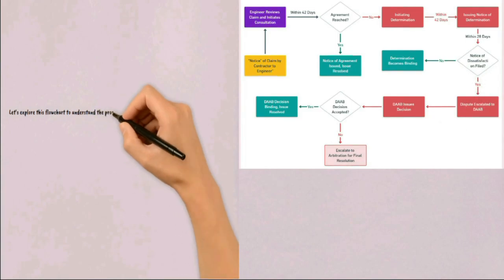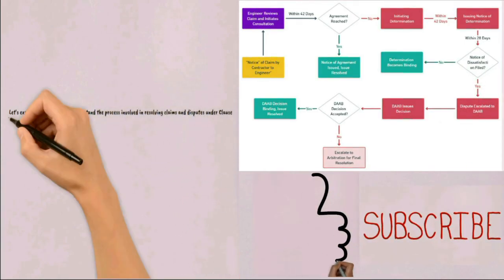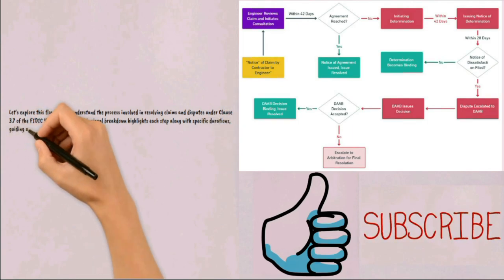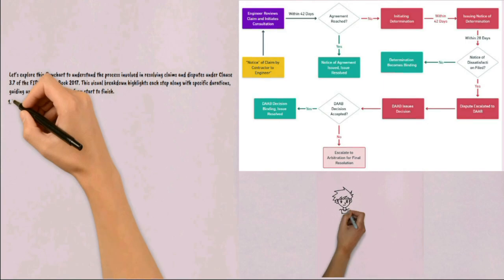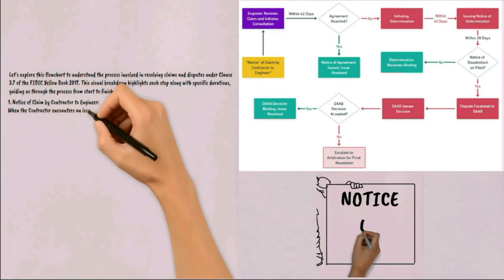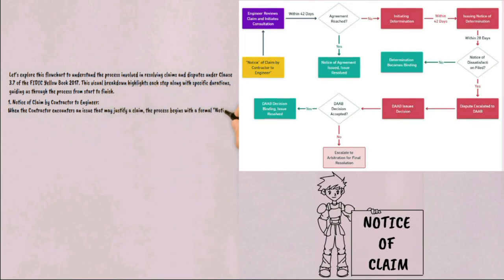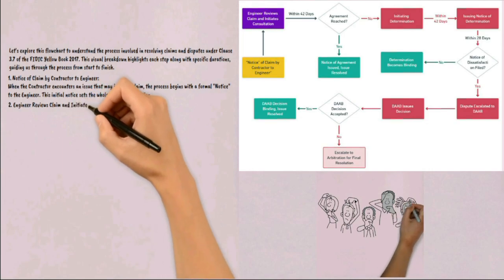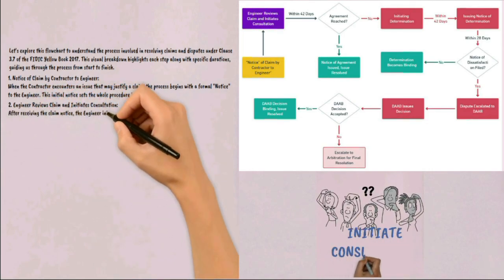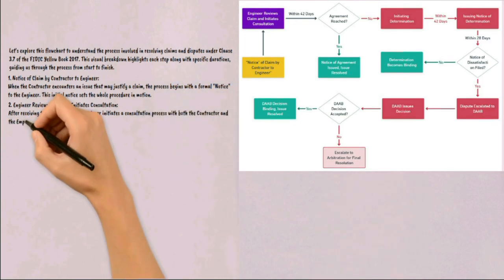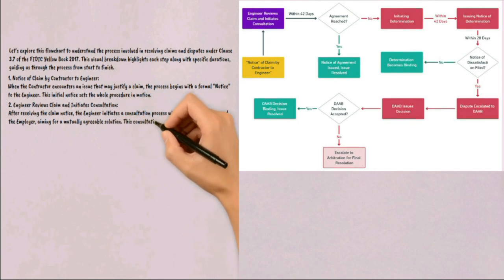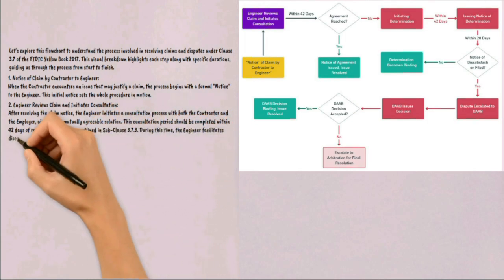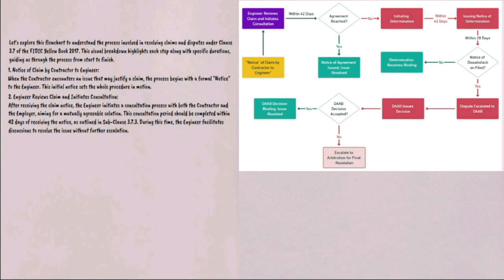Let's explore this flowchart to understand the process involved in resolving claims and disputes under Clause 3.7 of the FIDIC Yellow Book 2017. This visual breakdown highlights each step along with specific durations, guiding us through the process from start to finish. Step 1: Notice of Claim by contractor to engineer — when the contractor encounters an issue that may justify a claim, the process begins with a formal notice to the engineer, which sets the whole procedure in motion. Step 2: Engineer reviews the claim and initiates consultation — after receiving the claim notice, the engineer initiates a consultation process with both the contractor and the employer, aiming for a mutually agreeable solution. This consultation period should be completed within 42 days of receiving the notice, as set out in Sub-clause 3.7.3, during which the engineer facilitates discussions to resolve the issue without further escalation.